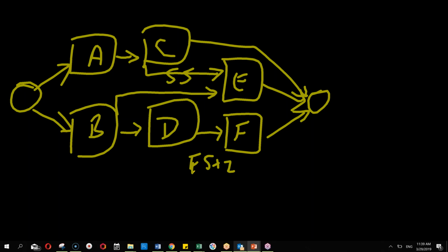Okay, understood. The point which I wanted to make was that without knowing the durations, you can still develop a network diagram. Normally, people do not understand this point, and they try to put dates and durations into it. We will ultimately be doing that, but as far as the sequence activity process is concerned, that has absolutely nothing to do with the durations. This is the sequence: a connected network diagram from start until end, showing all the activities properly connected, no dangling activity, no gaps in between. This is exactly what a network diagram is, and once you have made it, your job is done as far as the sequencing is concerned. You do not need to do anything more.